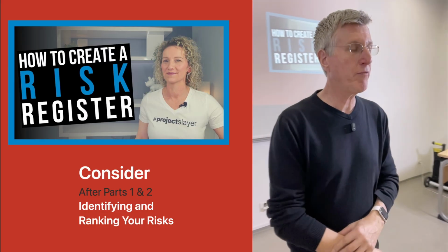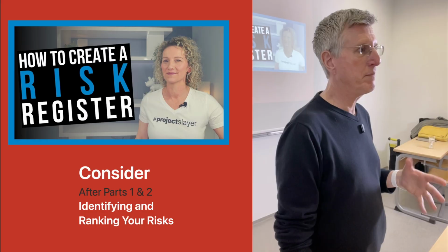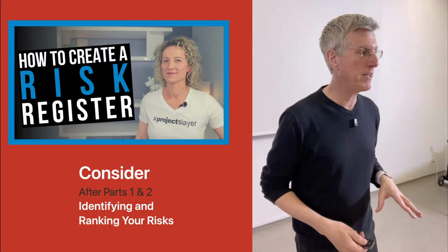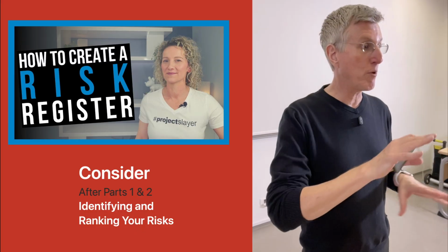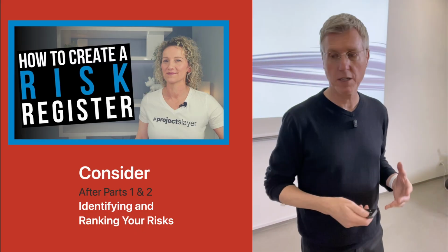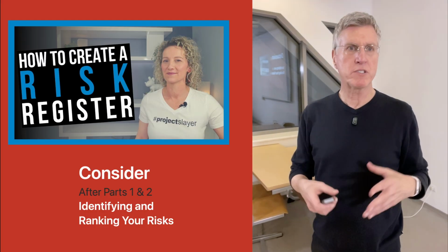And specifically for your project plans, I would recommend maybe the top 3 to 5 risks that you can identify and rank them in a matrix. I think that would probably be the most useful. You probably also want to think about how likely, what's the probability of these different things happening.